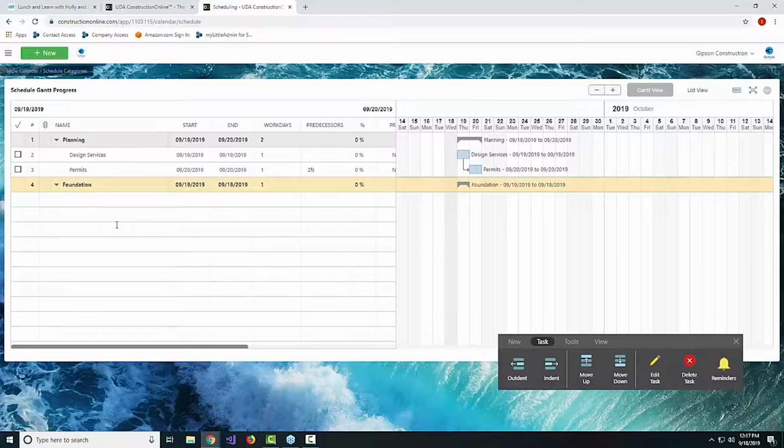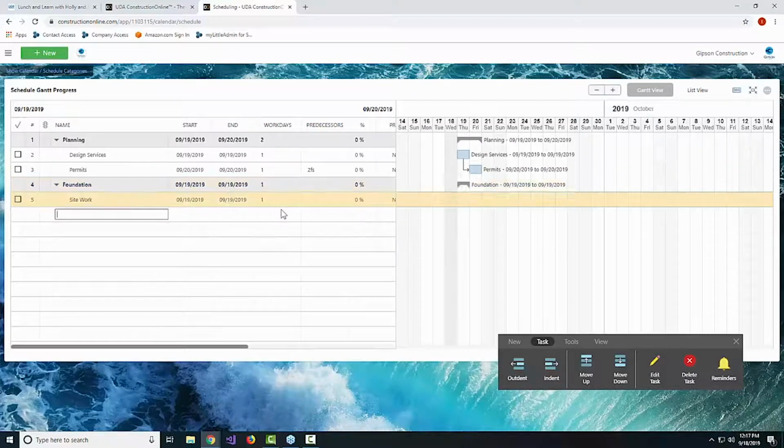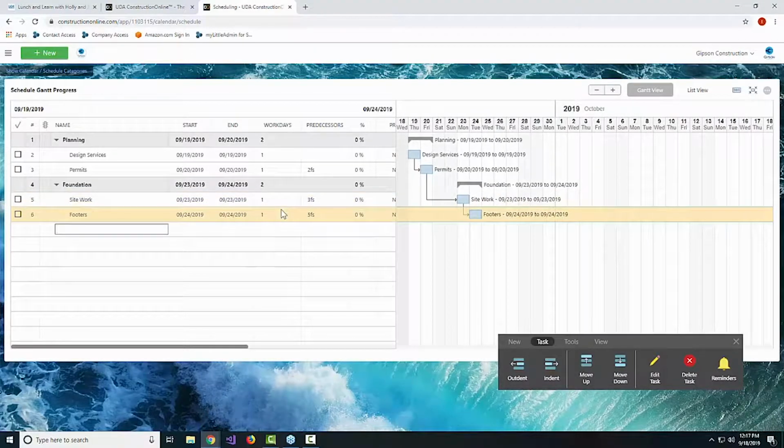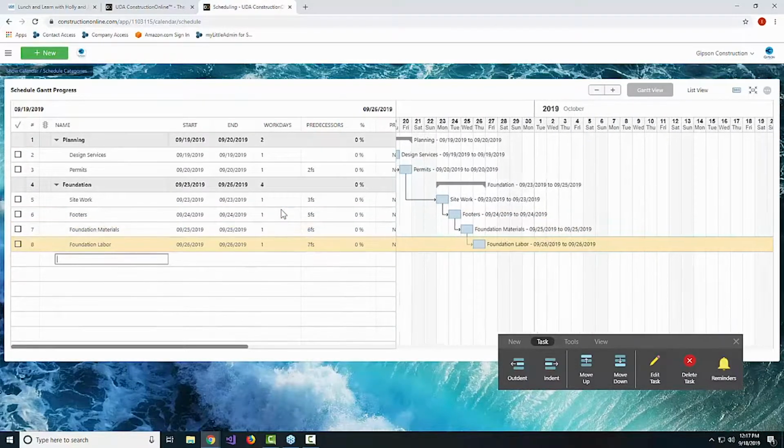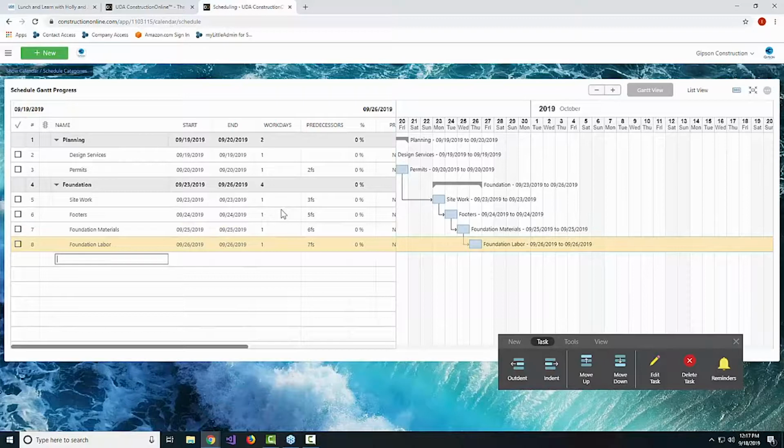So with a very simple connection point, you can really make your schedule work and update a lot of different information for you very quickly. Anytime that a scheduled task is delayed or needs to be updated in terms of the duration, you can leverage the predecessors to actually build and update your schedule for you instead of having to go through and update the start and the end dates for every single task after a certain point. This is the fatal flaw in using something like a calendaring system, which does not let you establish relationships between calendar event A